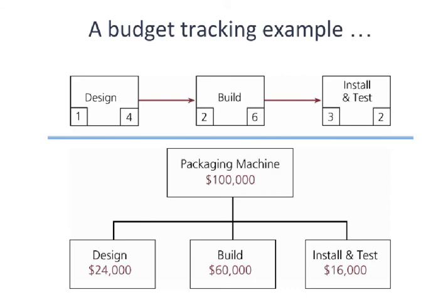Again, those have to add up to the total cost on the project, but you need to make sure they're realistic. You need to really build those numbers from the bottom up and not from the top down in order to know that they're realistic estimates of the cost necessary for that work package.